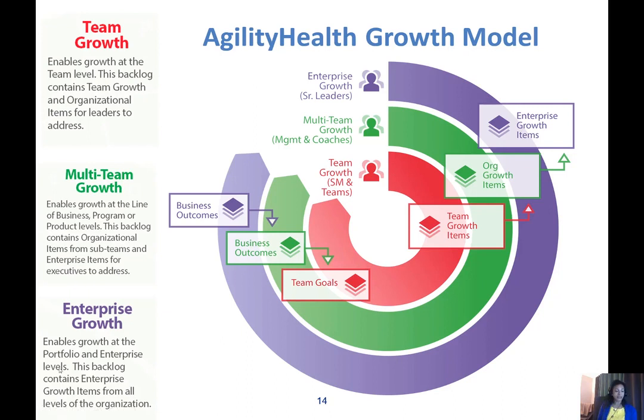Leaders use the list of issues escalated from the teams, and we tag them as organizational issues to create a backlog. So really we want the leaders to start practicing the same thing that the teams are practicing, of having a backlog of items that they're working on and demoing to the teams and saying, here is what we are working on. And here's how we're helping you.